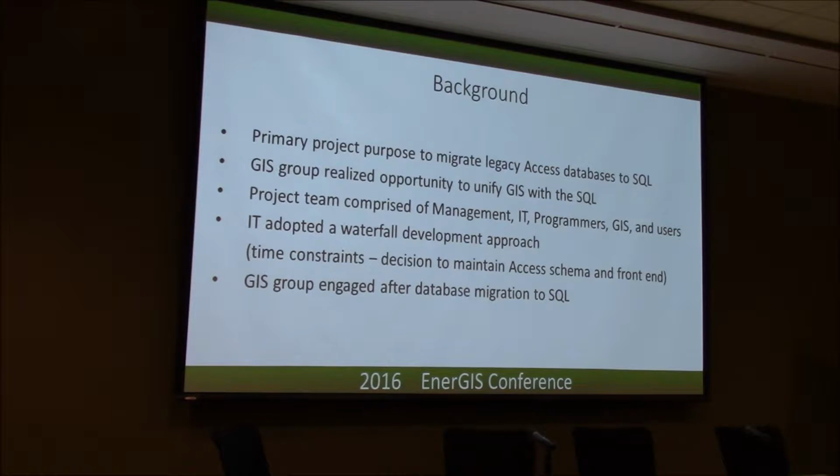Originally, the IT department took control over the migration from Access to SQL, and they took a waterfall approach, doing a chunk of work, getting that done, then moving on to the next chunk of work. And due to some time constraints and money, a decision was made to maintain the Access schema of the data. So the original schema of the database in Access was going to be maintained, but moved into SQL, just mimicked, and then the Access front end was going to be repurposed for the SQL database.